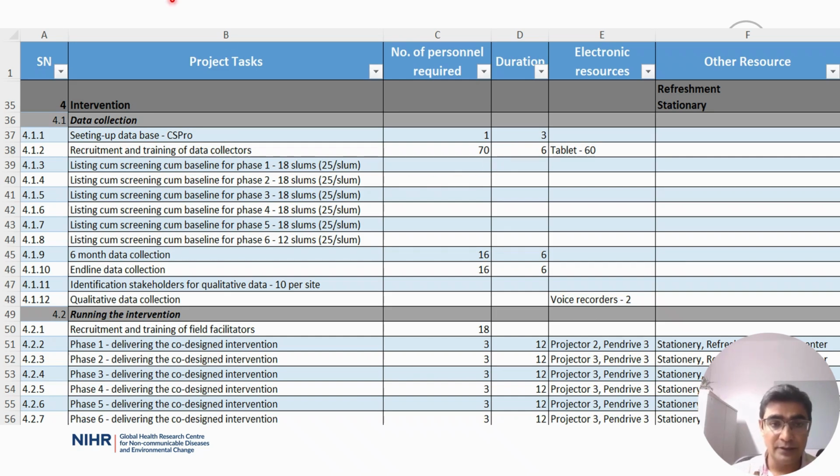For example, the project managers in Anumati we need for 3 years, supervisors for 2.5 years, and the data collectors we need for 6 months. Repeat this for every team member, for every task. This helps in tracking availability and commitment across the project duration.